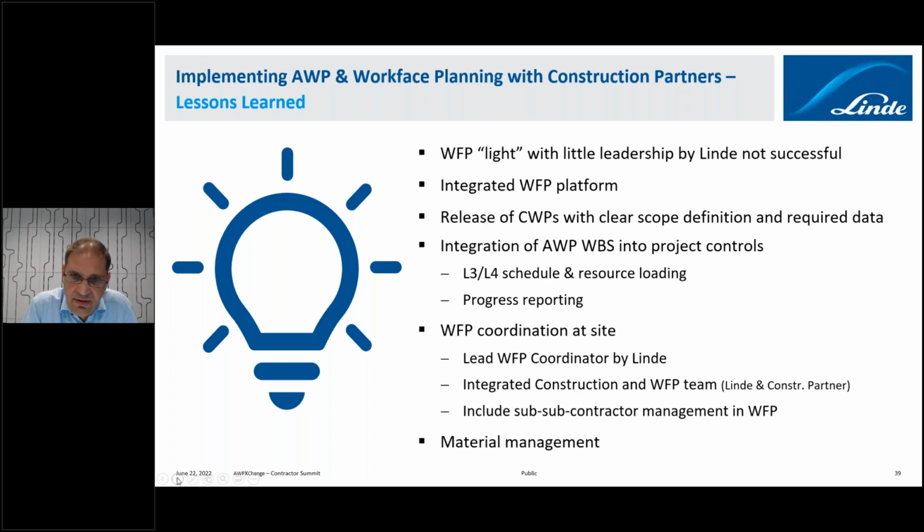Integration of the AWP work breakdown structure into project control, so that the level 3, level 4 schedule is broken down by CWPs. And what we have also learned and will focus more on is that progress reporting is also done by work packages. So this is the next step which we will take, but this was actually initiated by one of our construction partners, that they really want to take this holistic approach.